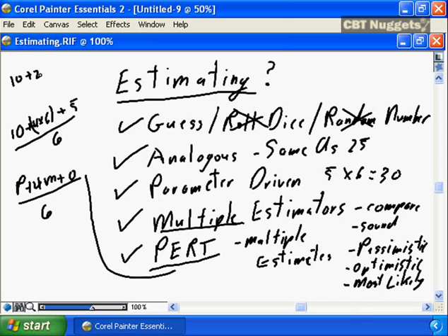So it's 10 plus 24 plus 5 over 6, or 39 over 6. And I don't have the mental math in my head for 39 over 6, but the result of 39 divided by 6 would be the final estimate that you would use for your project based on the PERT technique. So estimating, they are guesses. But develop processes so that you can develop good, solid, realistic estimates that will identify the work that is required to complete each and every element of your project work breakdown structure.